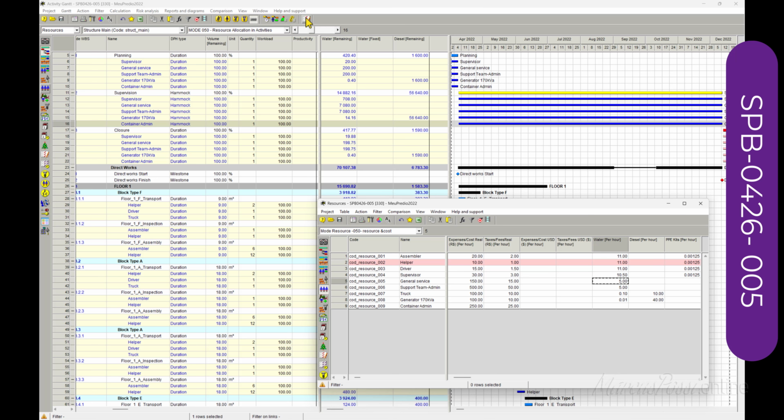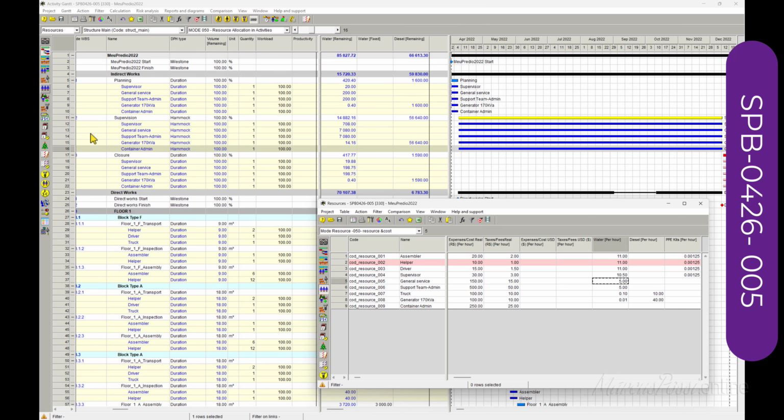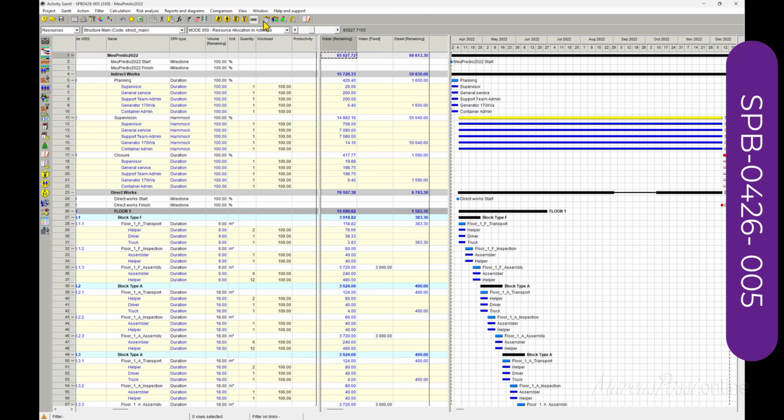When you recalculate everything, please take a look here: water remaining. Recalculating. The amount of water increased a lot, automatically, without reassigning every value for every line just because a general change happened to your work site.